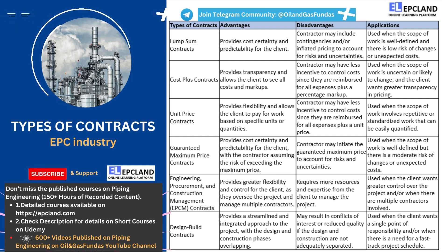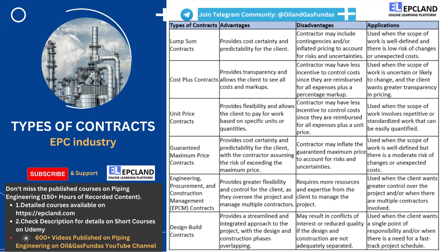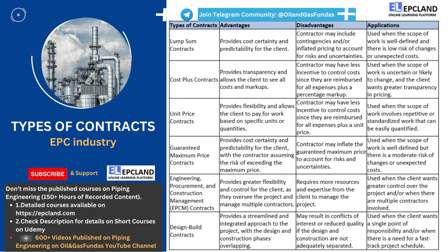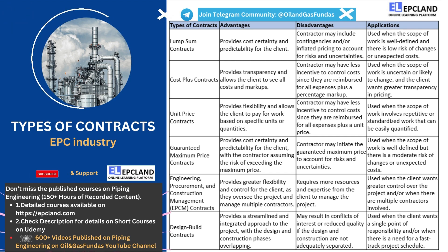However, there are also some potential disadvantages to cost plus contracts. Because the contractor is reimbursed for all expenses plus a percentage markup, they may have less incentive to control costs. This can result in higher overall costs for the client. Overall, cost plus contracts are best suited for projects with an uncertain scope of work or a high risk of changes. They can provide greater transparency in pricing, but may result in higher overall costs if the contractor does not effectively manage costs. As with any type of contract, it is important to carefully consider the specific terms and conditions of a cost plus contract before entering into it.